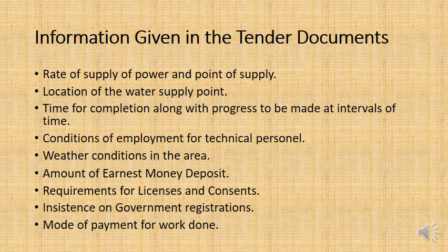The amount of earnest money deposit required, we'll talk about earnest money deposits in a moment, also security deposits, licenses and consents. If you need to get special government permissions to carry out the work, you need to state what that is. That will be on the contractor's side, his responsibility to get those consents.